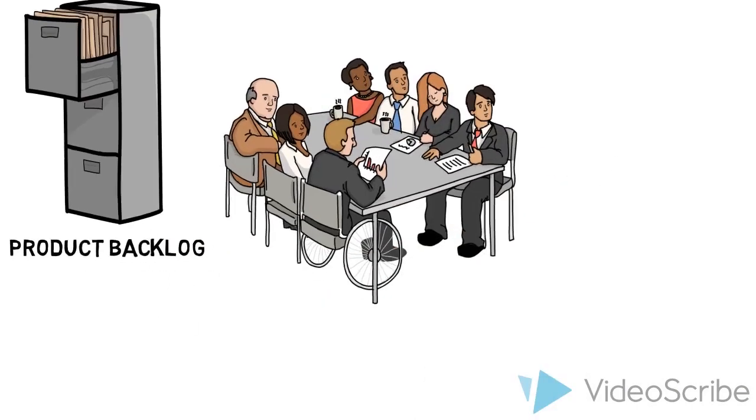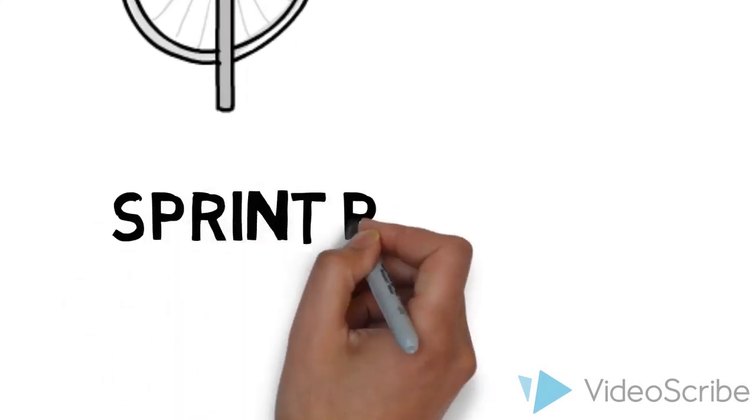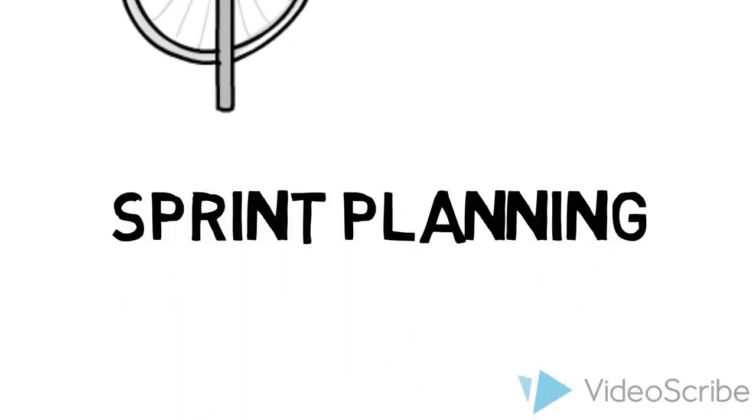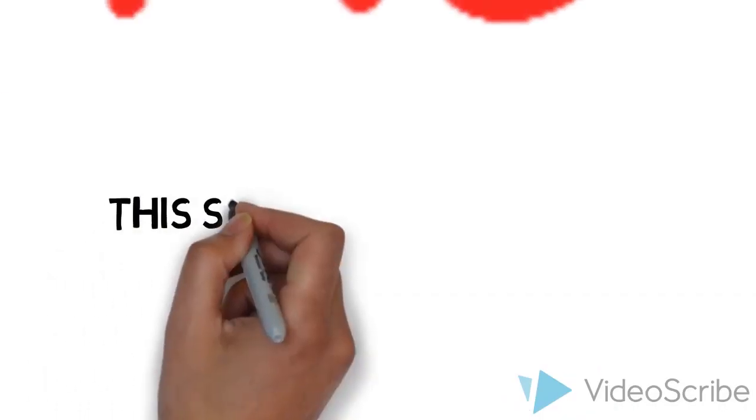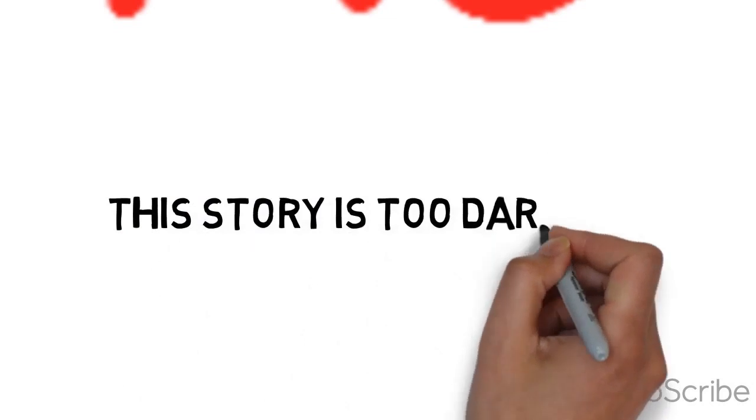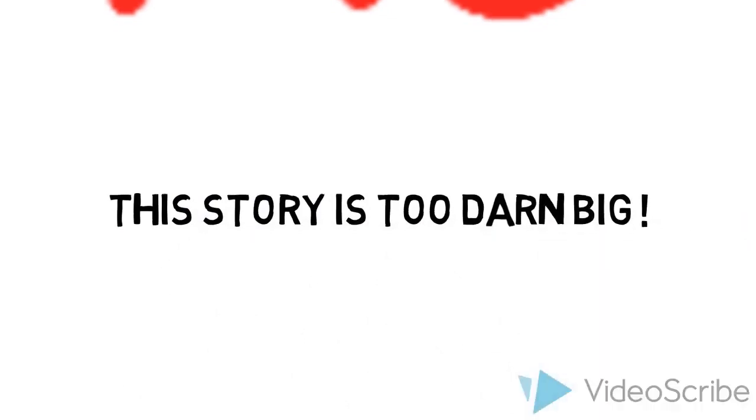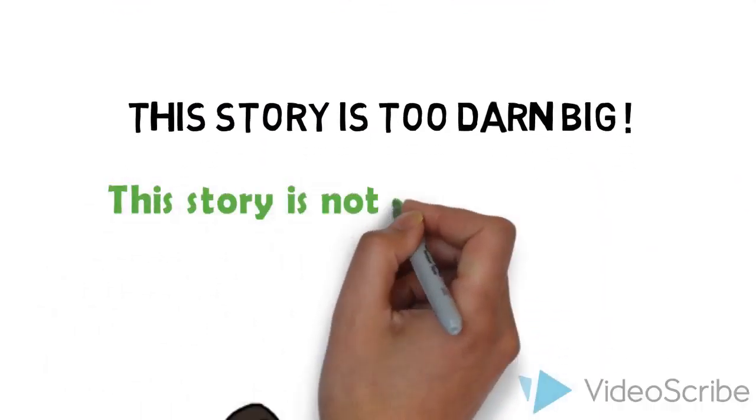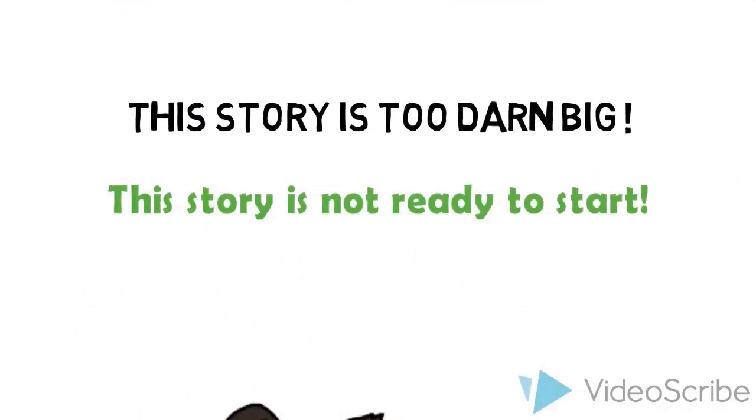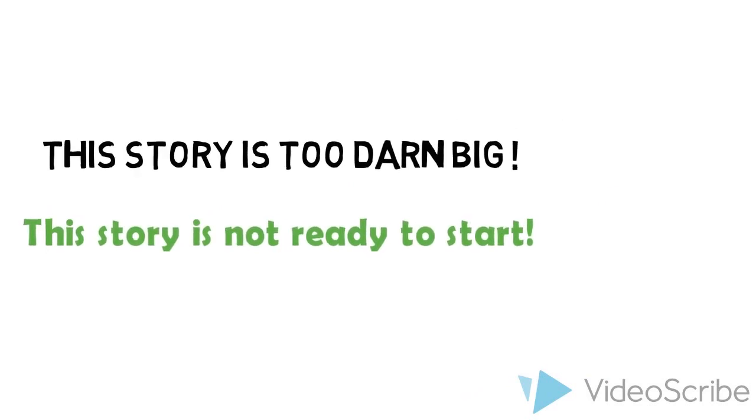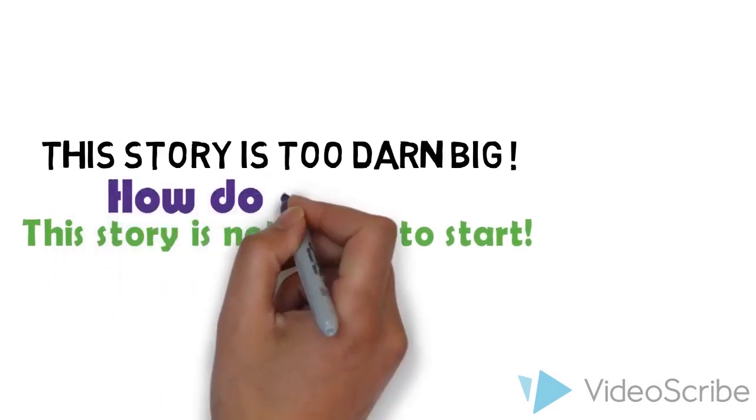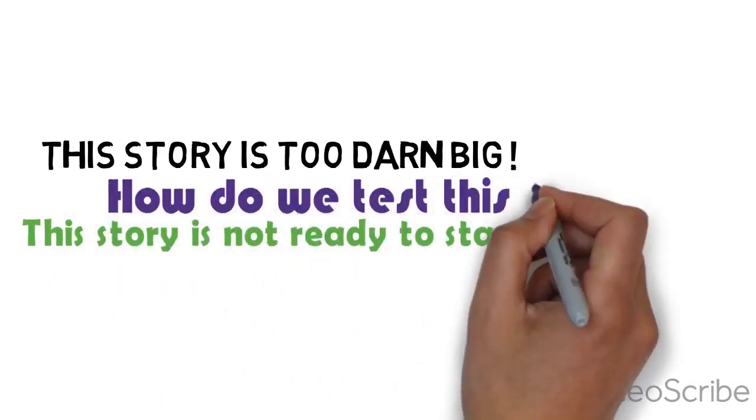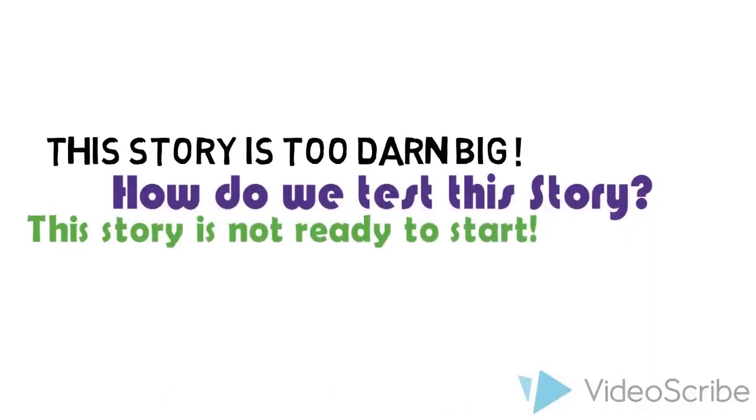The team gets together at the beginning of every sprint and does sprint planning, where they talk about several things like sizing stories, coming up with tasks, and getting a plan together that they can execute for the next sprint.